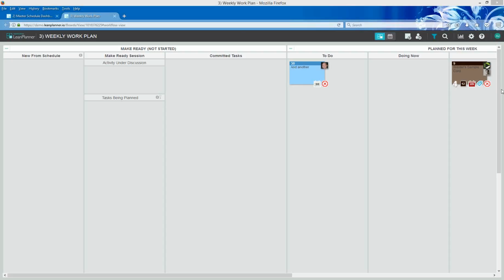Just recently, I completed an acquisition integration. I used QuickBase, but that's more of a business type application, which about 6,000 companies use. The concept is very similar, but I got the acquisition integration completed ahead of schedule and 25% within budget. But this is the key: managing tasks on a 2-week look ahead so that everybody is on the same page. The governance was key also. I was the one managing that so that I could keep everybody on track on what activities were falling behind or could fall behind within the 2-week look ahead window. Without that governance and monitoring, it'll be very tough to keep everybody in control.